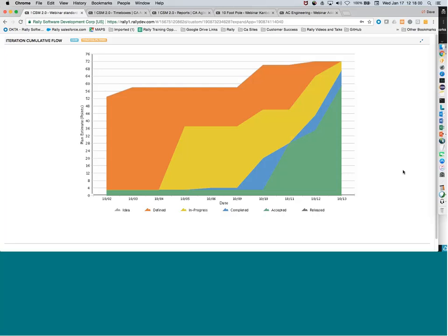Could be they were different sized items. The number doesn't necessarily account for the size or complexity of that item. So it may be that there were just fewer items completed and that was because each item involved more work or had more to it than in previous months. The idea is using these measures gives you the ability to predict better what you're going to be able to deliver in the future, and gives you those measurements to help know what your capabilities are as you move forward.